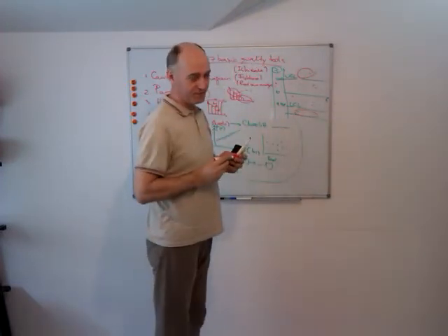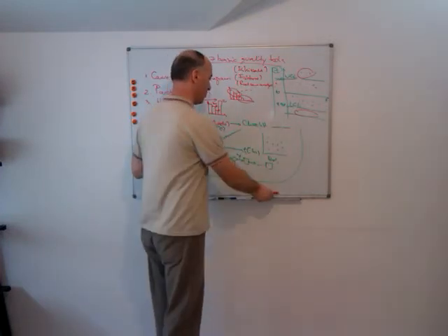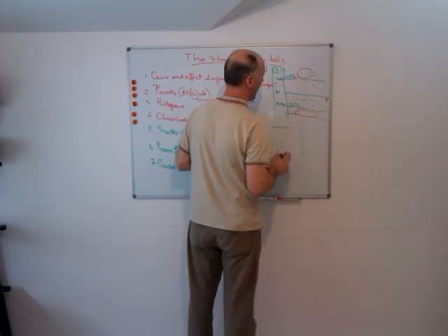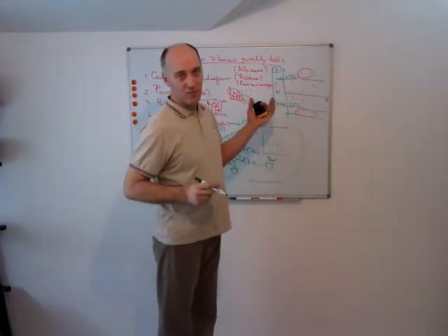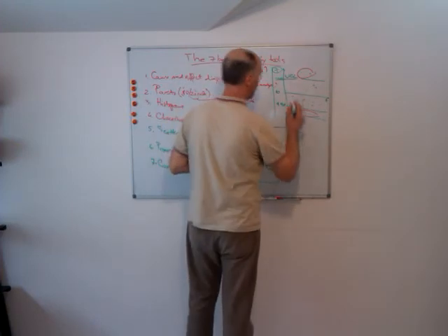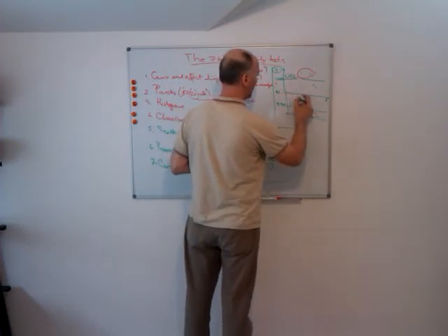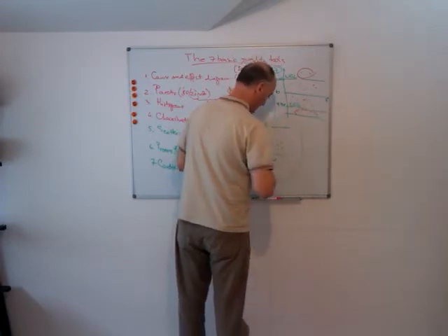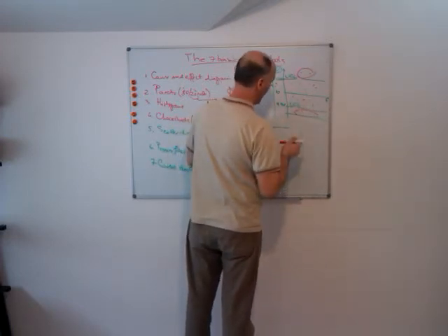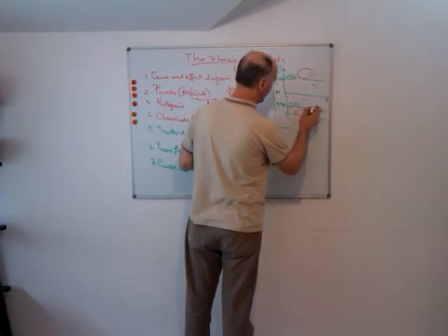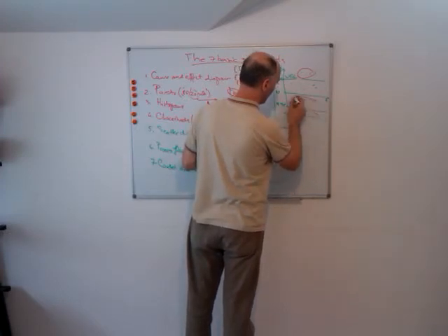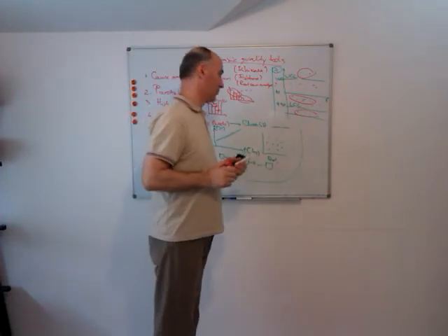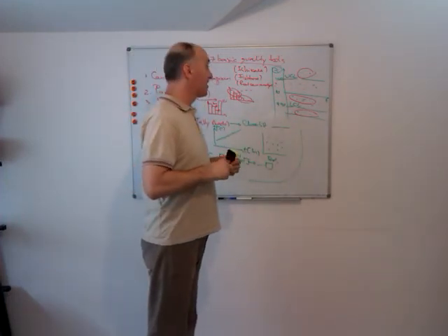Another element showing that our process is out of control is if you have 7 consecutive points on the same side of the mean. This is the mean or the average. 1, 2, 3, 4, 5, 6, 7. So if you have at least 7 consecutive points, that is another indication your process is out of control. So this is the rule of 7.